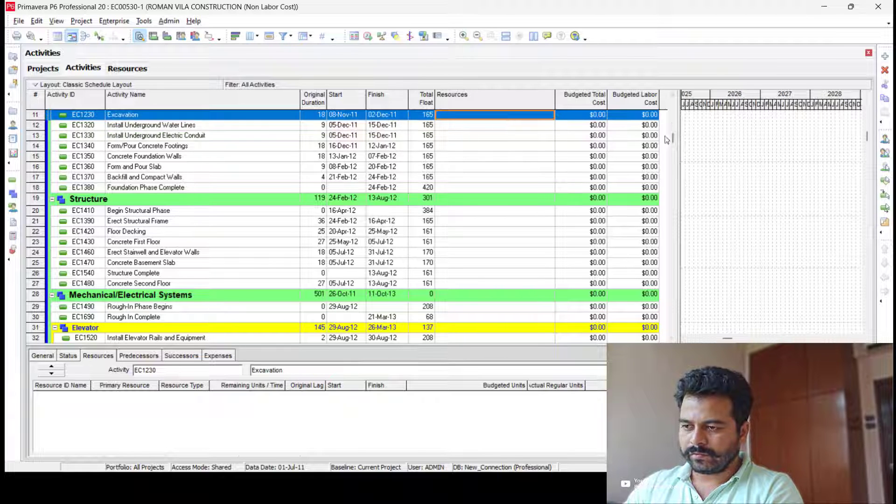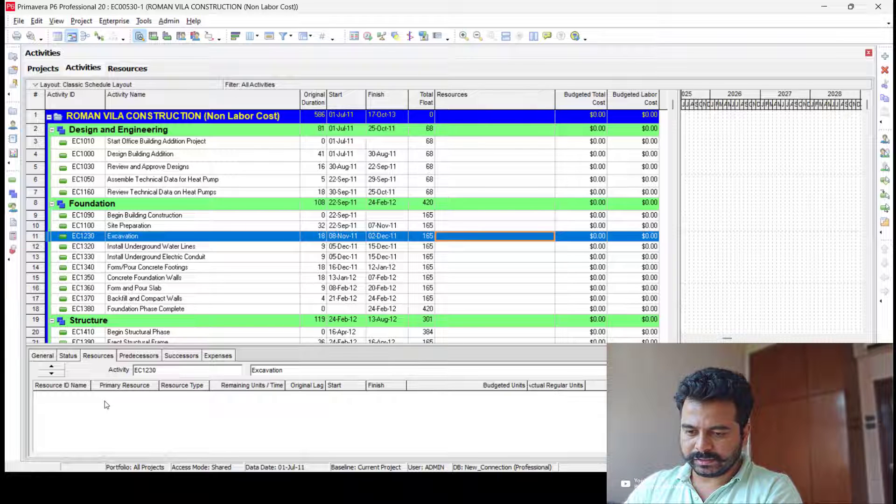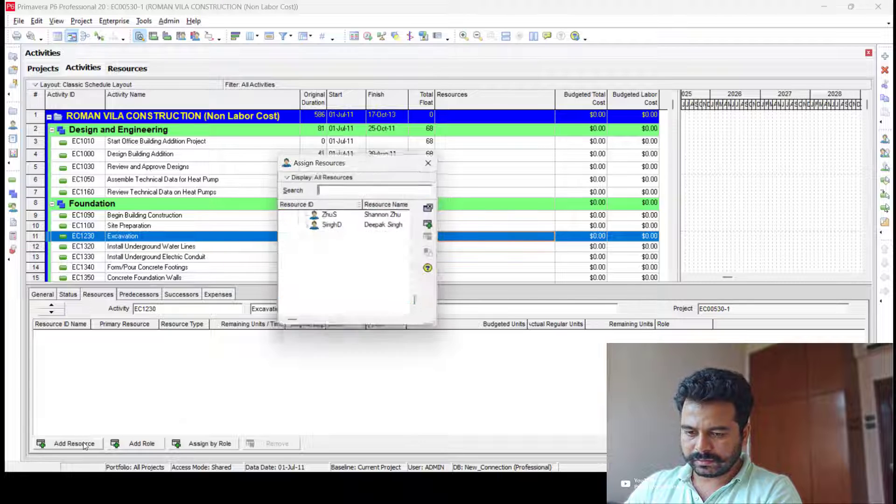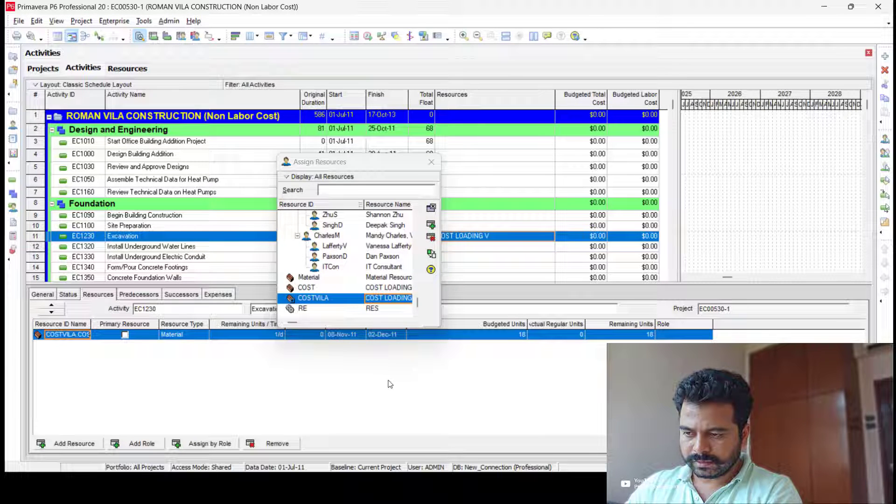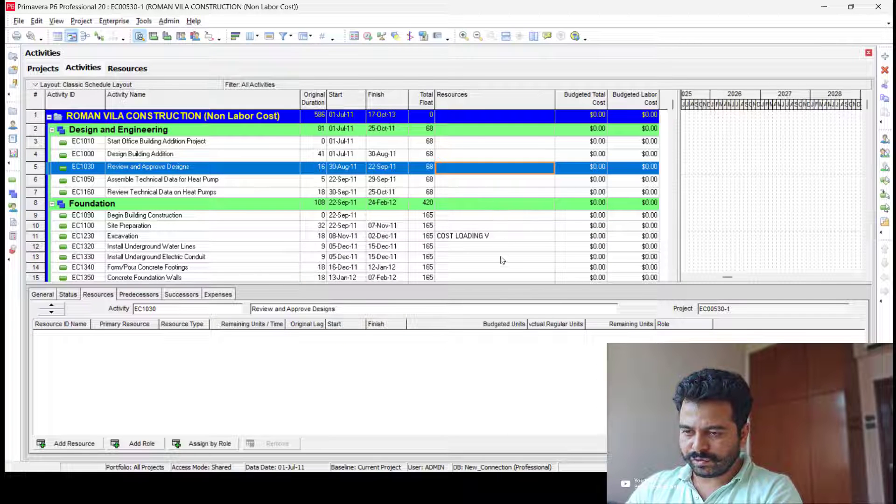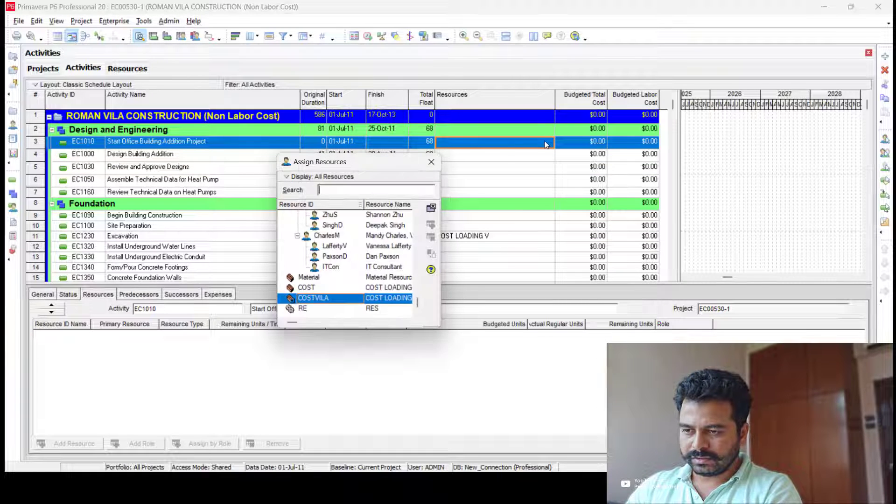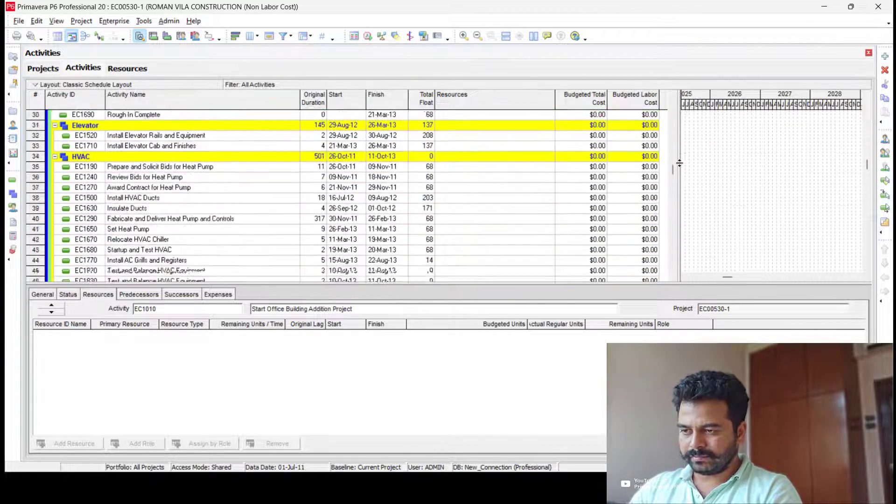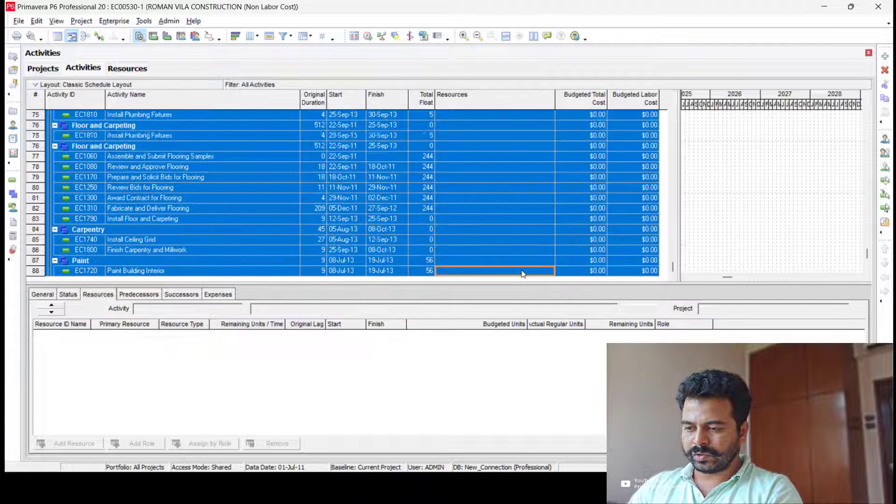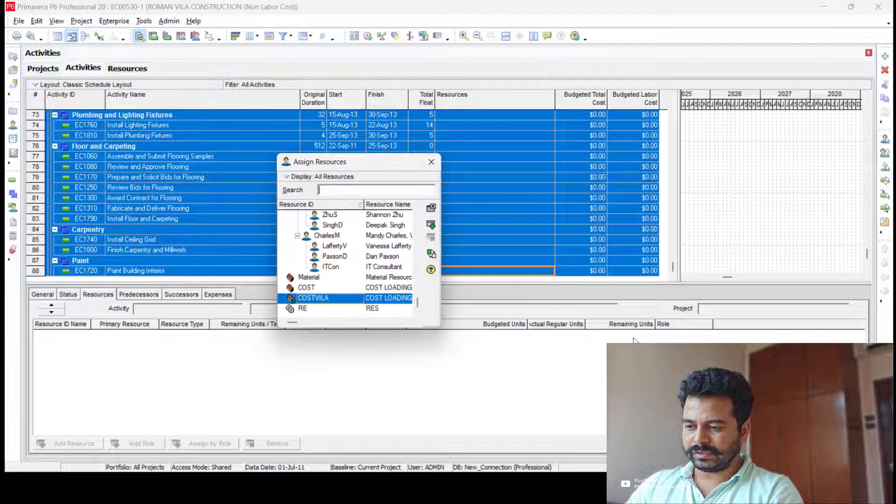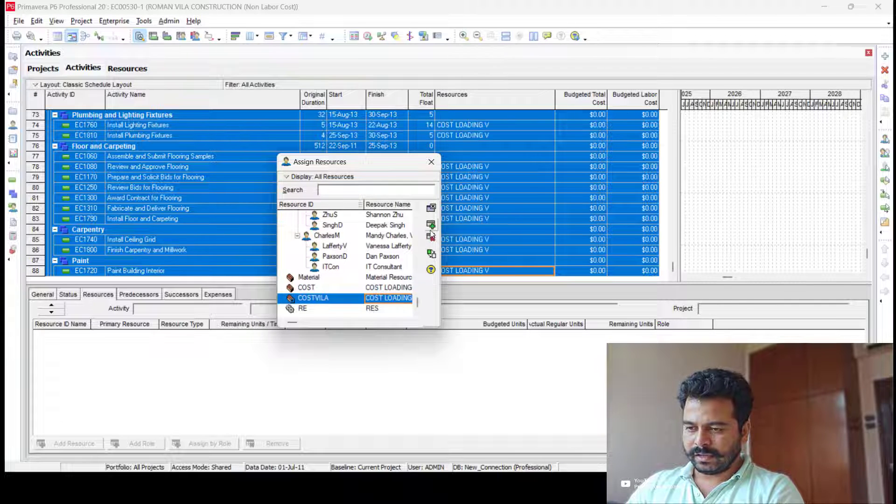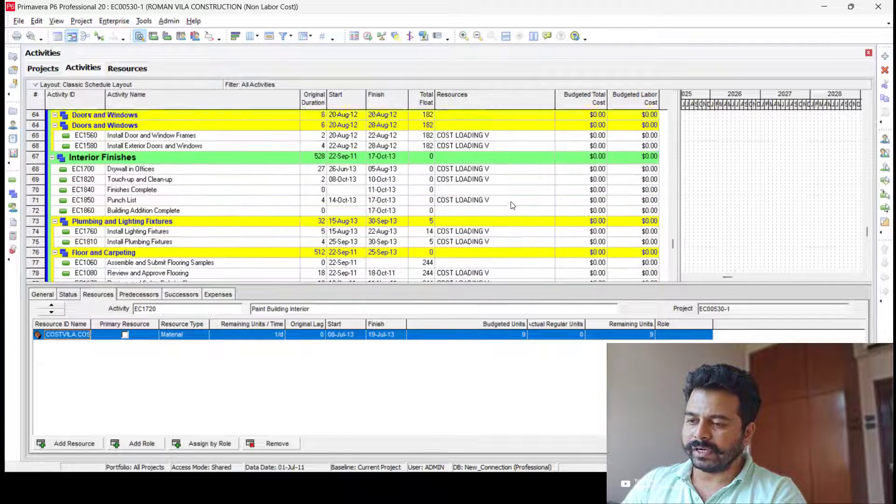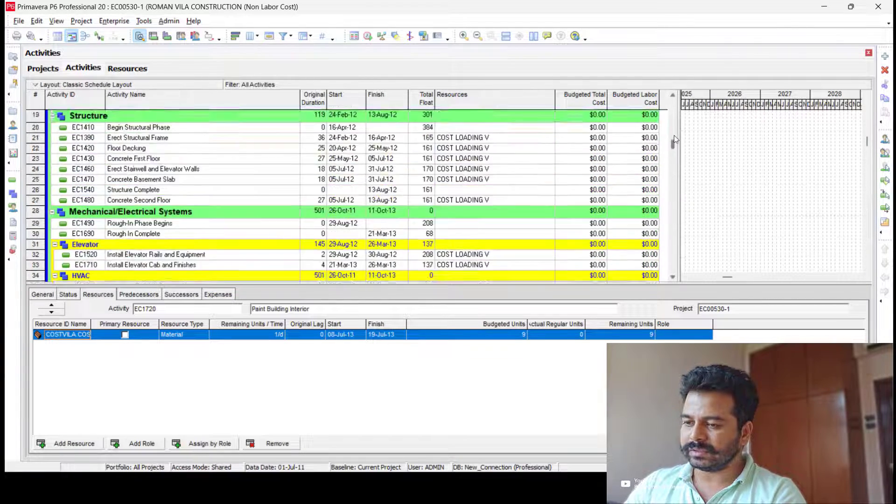Instead of assigning resources individually one by one, what you could do is select the entire column from top to bottom, right-click, then select Assign Resources. That's all—very straightforward. You can notice the resource is assigned.